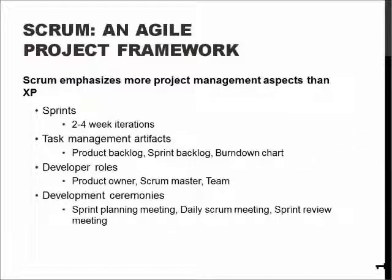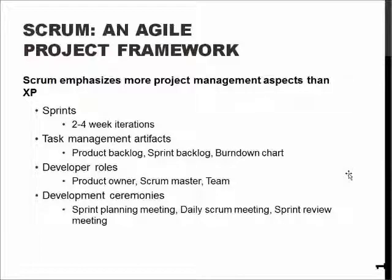The team implicates all the people doing work within the project. There are also development ceremonies — more or less just meetings or ways of doing things. For example, a sprint planning meeting where we decide how the current sprint will be done, or daily Scrum meetings, which are stand-up meetings lasting about 15 minutes where everyone says what they are currently doing and what their current task and objective is, so that people can know what each other are doing.